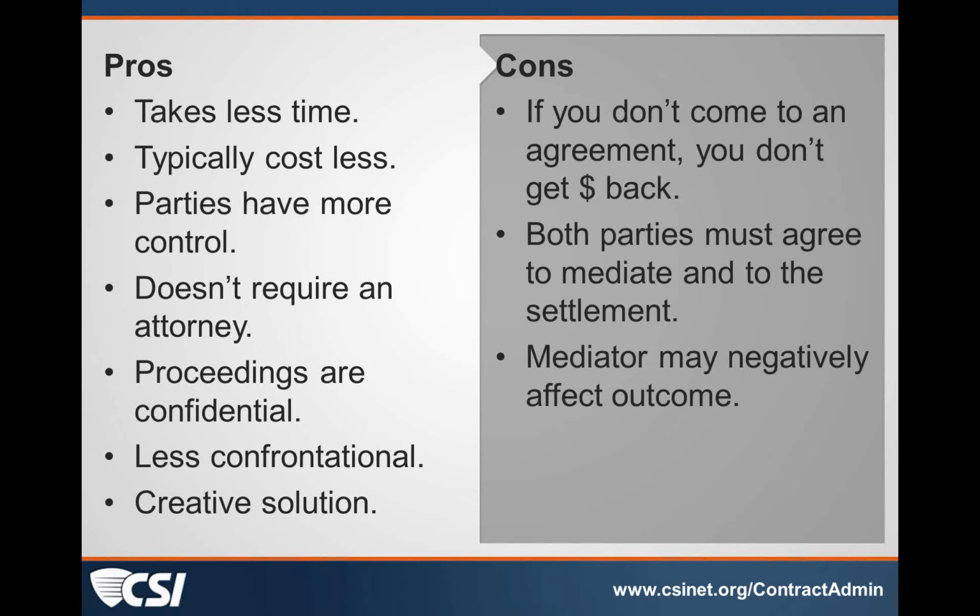I would suggest that be addressed in the contract. Most construction contracts that I've seen have a provision that states that claims need to be submitted within X number of days of the occurrence. A lot of times an occurrence may happen, and you may know it's a change, but you may not know what the dollar amount is.